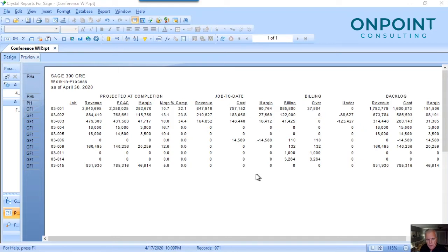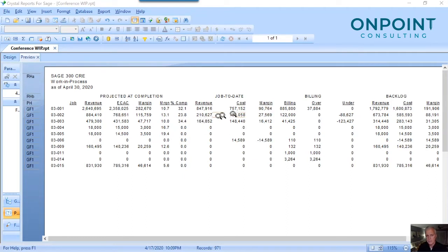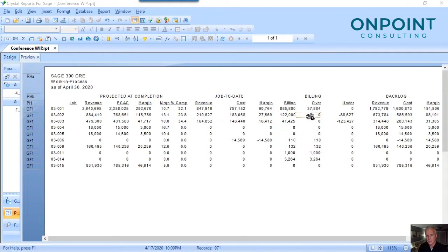This is a custom one that we've done for Sage Timberline CRE. You can see it starts with your jobs, your estimated cost of completion, your estimated margins and that percent. It goes on across to the numbers that fall out of accounting — your cost, the billing that you've charged your customers, and then based on your calculated margin and earned revenue, your over or under billing. And then very important right now in the climate that we're in is your backlog in terms of revenue, cost, and margin.